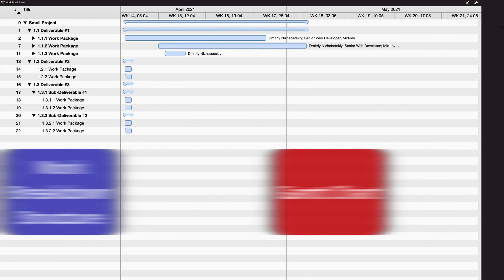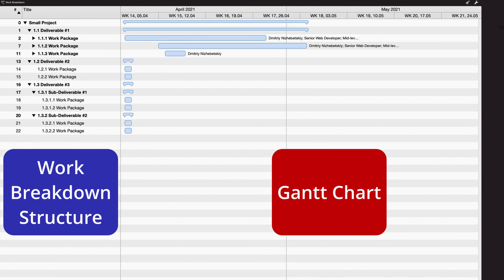On the left-hand side, you have your work breakdown structure; on the right-hand side, you have a Gantt chart at once. Even if you don't use a work breakdown structure, you can simply list out all the tasks and create a Gantt chart from them. The biggest benefit is that you can group related activities under deliverables or work packages, and the Gantt chart will show that as well.